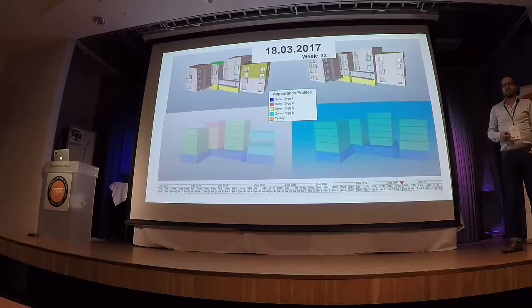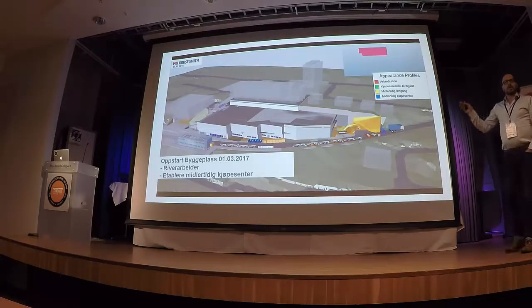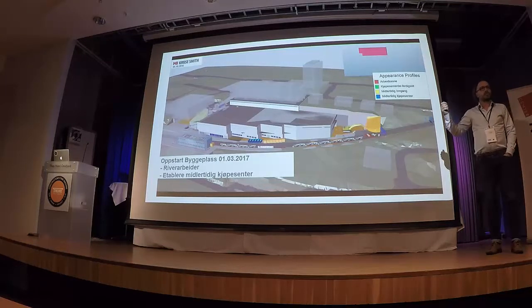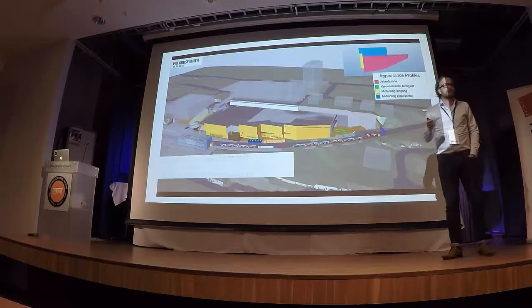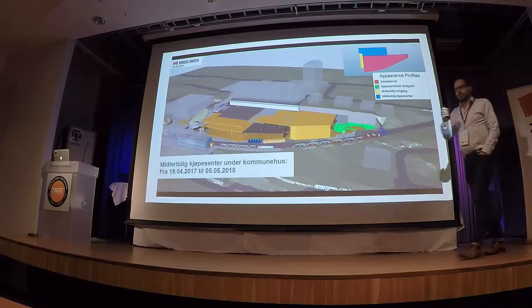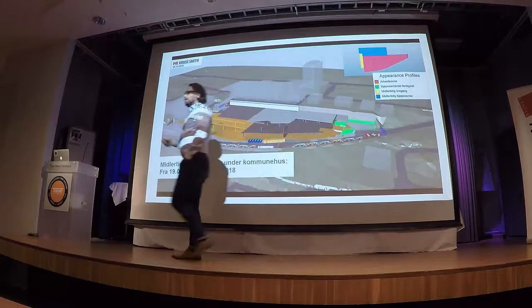On the movie, that was a massive rebuild of a shopping center and offices, where we really worked on the 4D model to find the schedule that allowed us to keep the shopping mall open. It's very important to have the shopping mall open because my local Vinmonopolet is based there.